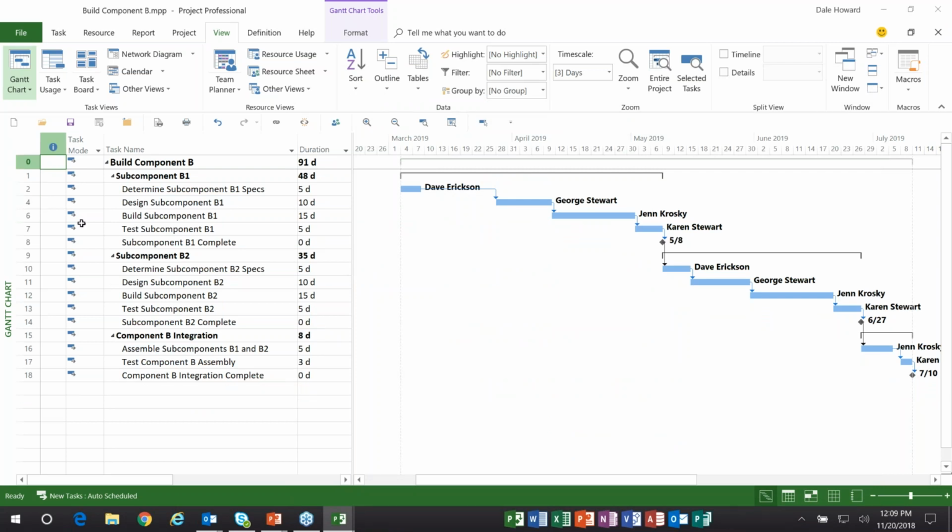We're missing number 5. There is no way to get the missing numbers or to get these ID numbers renumbered so that you don't see something is missing. You just have to have the knowledge that this is a sub-project of a master that is linked to other projects with cross-project dependencies, and the ones that are missing are the external tasks.